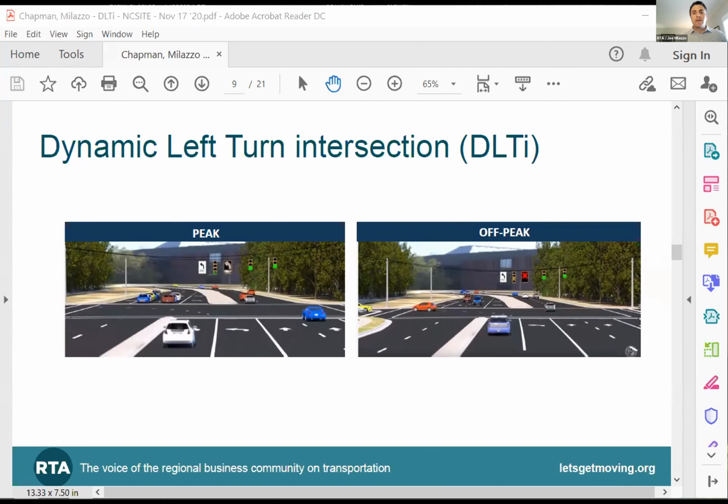and you don't need to go through this process. Other criteria the department used was having a city or town with engineers and leaders receptive to innovative solutions, in this case, dynamic left turn. There have been actually several that were interested in this, and the one that worked in terms of a location meeting these criteria within the Triangle, with the signal system ready, was in Cary, at the corner of Tryon Road and Cary Parkway near the Colonial Baptist Church, about a mile from that.